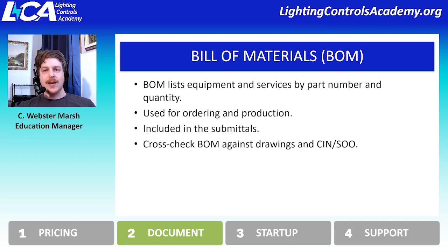And so, as I mentioned, you want to cross-check those bill of materials against the drawings and even the control intent narrative sequence of operations for services, because the BOM is going to list those services. So if there's startup services or specific integration services that need to be provided, then that should be included in